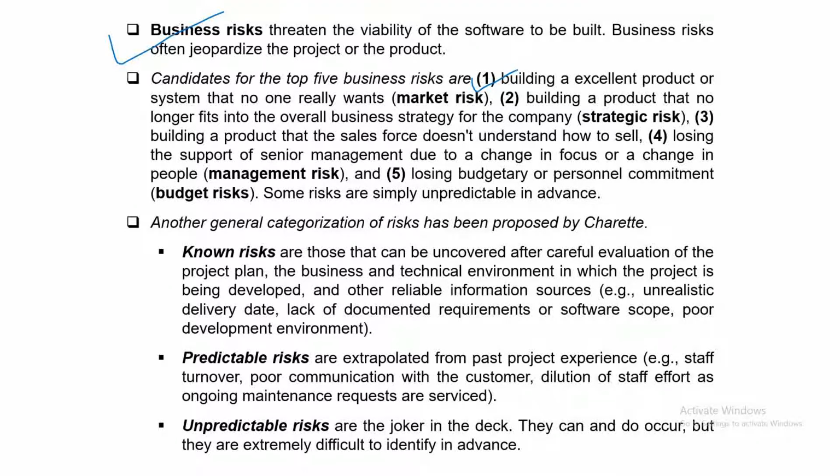If you miss that particular deadline, then even if you are ready to give your product free of cost, nobody wants to use it because the time when it was required, the software was not ready. It is known as market risk. It is one of the subtypes of your business risk.